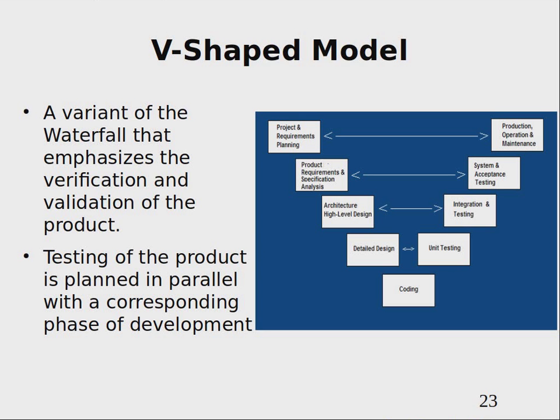And the V-shaped model, sometimes called the V model, is an evolution of the waterfall model. So it has a bigger number of stages. And the difference here is that for the waterfall model, the vertical axis didn't show anything particularly important except dependencies, whereas in the V model, the vertical axis represents the technological stack or technical complexities.